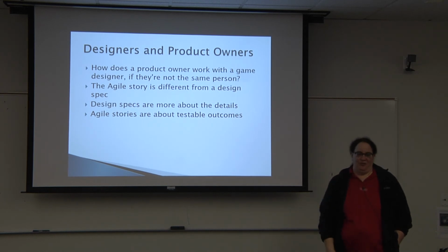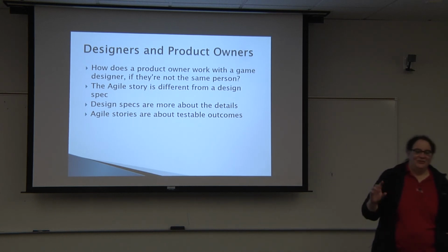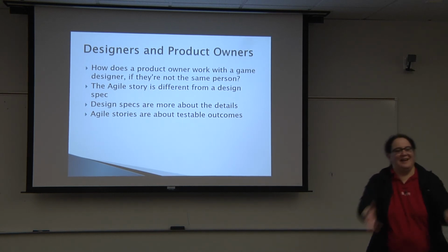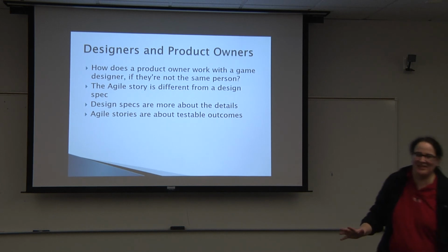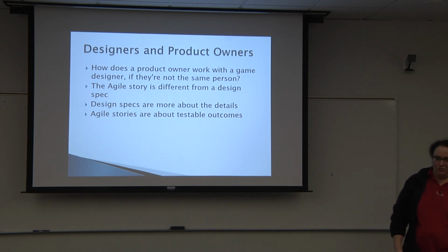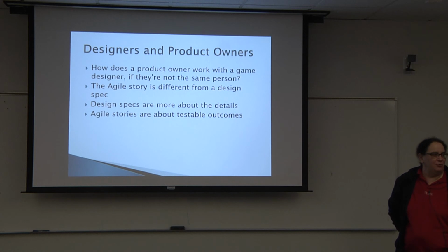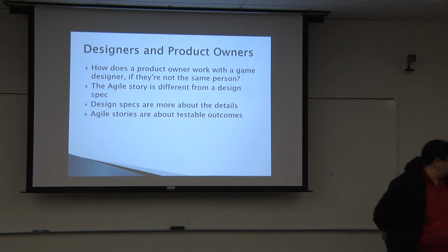You write that as a separate story. You don't, in the middle, this is that whole breaking the sprint thing, say, hey, I need you to change this whole thing because we didn't think about it. You get the best work out of people by giving them an uninterrupted sprint in which to work. So we try desperately not to break the sprint.